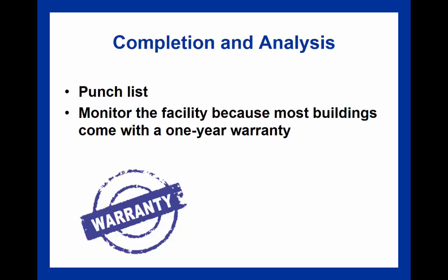and control would be changed from the builder to the owner, and you'd have a final inspection, making sure that the engineer accepts the project as final, and that it's done so on behalf of the owner. And this would be done so that the contractor can actually submit their request to be paid that final amount of money that's owed. And once that all is done, then the occupancy permit will be provided, assuming that it passes inspection. And once that occupancy permit is provided, then it would be opened for the public.